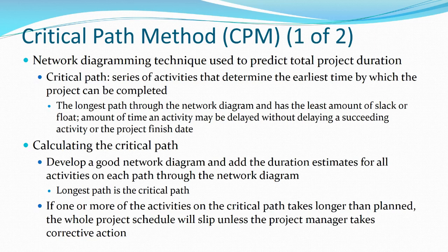If you develop a series of potential paths through a project and sequences of events, the critical path is the longest path. It shows up in Microsoft Project as the red path when you view the network diagram. And if you mess up any of the schedule in the critical path, the project is going to be behind schedule. You may have more slack or float in other paths through the project, but not through the critical path.